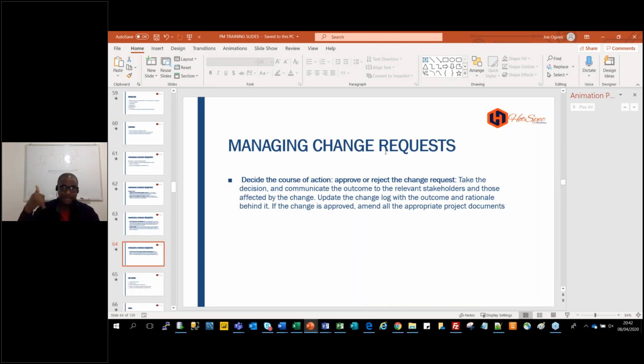Raise the request. Prioritize it, yeah. Must we do it? Does it really impact us? Like, we need to do it now, or we could do it later, or you know what, we don't really need it. Then you do all the assessment, the prioritization assessment. That's a technique for BAs and for PMs as well. Again, you do your impact assessment as BAs and PMs. It's very crucial for us as well. You need to understand that.